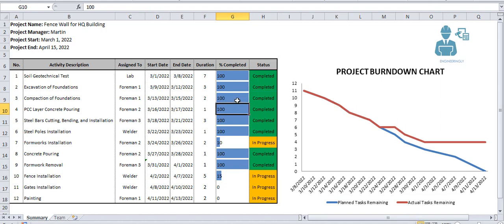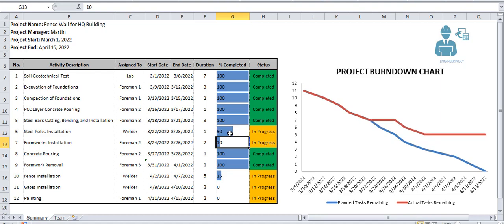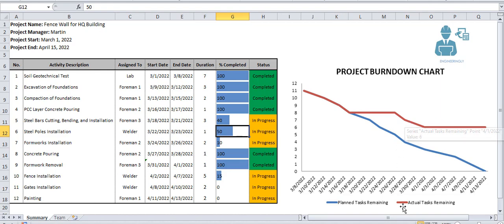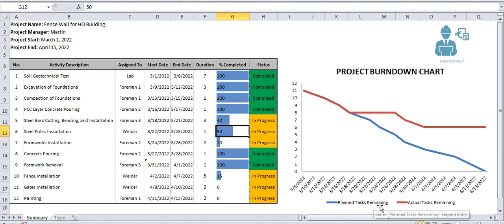Besides this table there is another chart on the right which is getting updated when you change the stats of each activity. As you can see, for example I'm putting these steel bars cutting, bending and installation to 40%, as you will see the burndown chart is getting updated as well. So what does that represent? The red line here is the actual tasks remaining and the blue line is the planned tasks remaining.